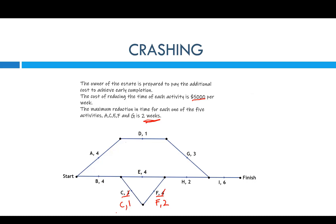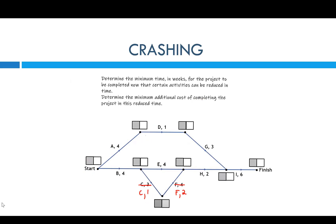So now we're going to do forward scanning and backward scanning again to get a new completion time. We're crashing activities on the previous critical path — C and F by two each. Starting at zero, going to four, plus one is five. Over here, four plus two is six, but going the other way gives eight — so we take the longest, which is eight. Then eight plus two is ten, and ten plus six is sixteen.